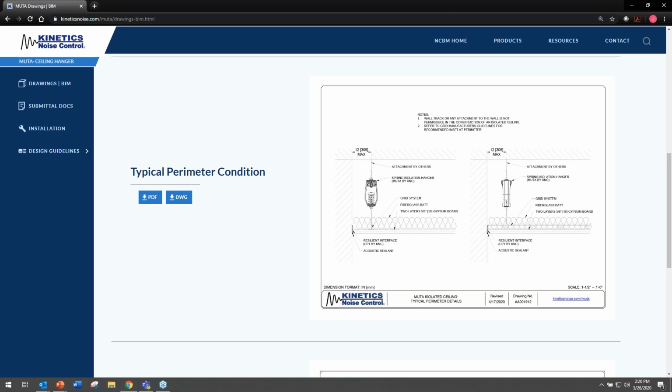I can tell you that generally speaking, after it's delivered to the job site and everybody's done all their markups, we see these things conservatively somewhere between $25 and $30 a piece. But again, the size of the project and the shape of that ceiling has so much more to do with what the final costs are going to be.